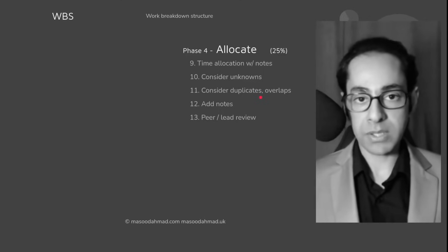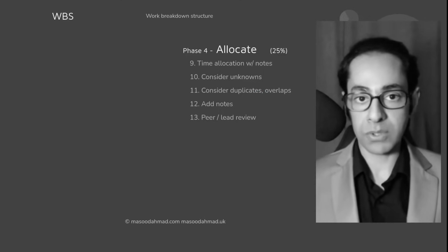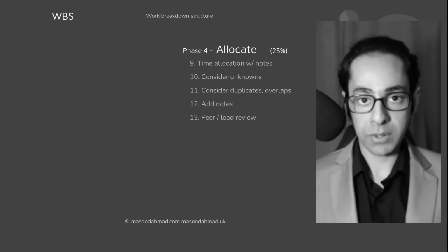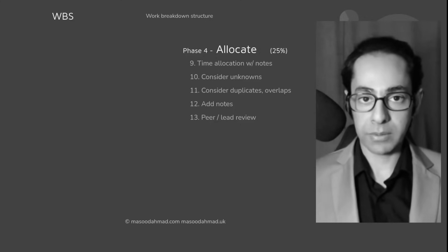For example, you did some similar tasks and the later task is almost the same. You will not give the same hours again because assuming the task would be already done. Let's say you create one banner in the page and you need a similar banner with slight changes in the text. You would just copy that and duplicate it.